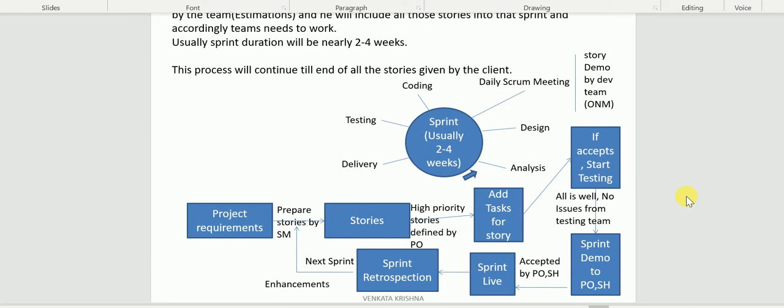So with 6 productive hours, let me assume 20 working days, everybody has 120 hours. 4 members are there, so 480 hours is their capacity.